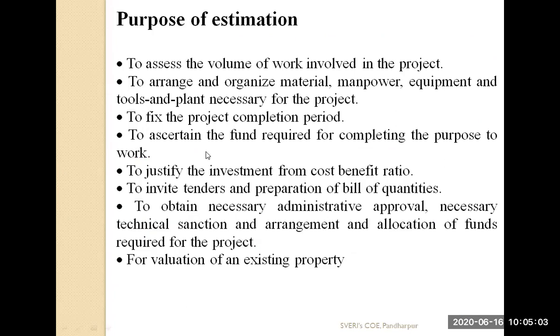Then the most important part that is asked in your examination: why we prepare the estimate, the purpose of estimation. Once again we are going to revise it for some time. It is to assess the volume of the work which is required, then to arrange and organize the material, manpower, equipment, tools and plant which are necessary for the project, we require the estimate. Then to fix the project completion period, that is, within the stipulated time we have to complete our project, again we require the estimate. Then to ascertain the fund which is required, again we require the estimate.